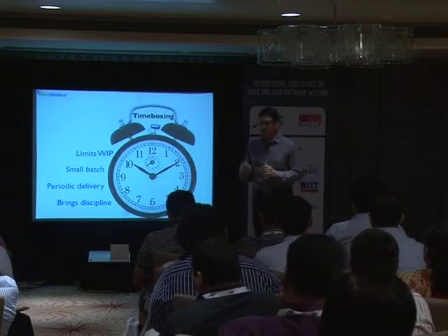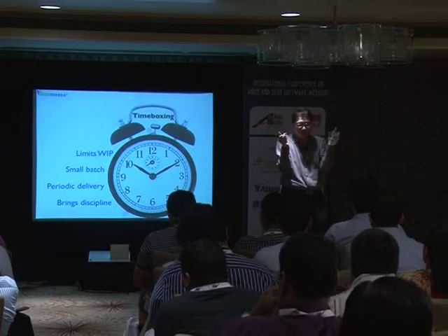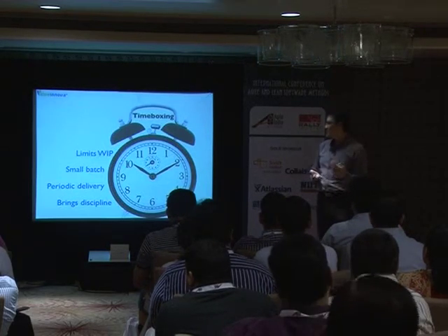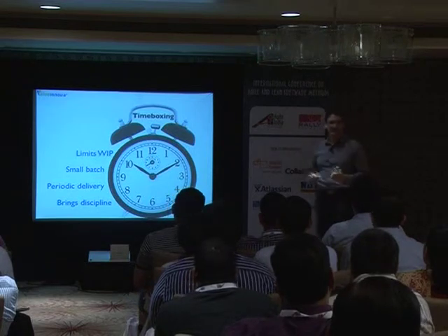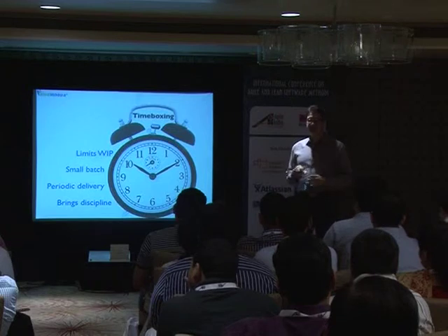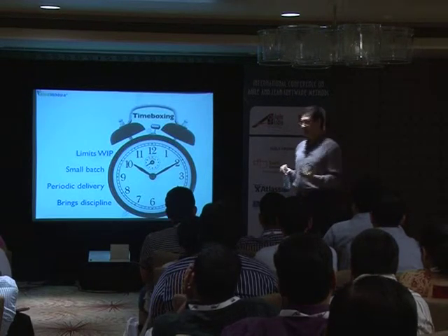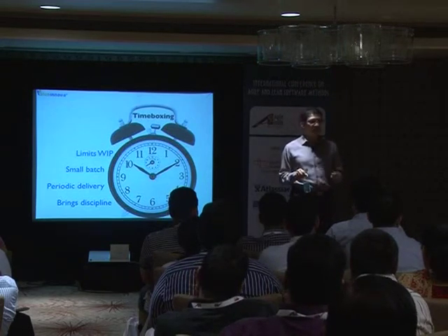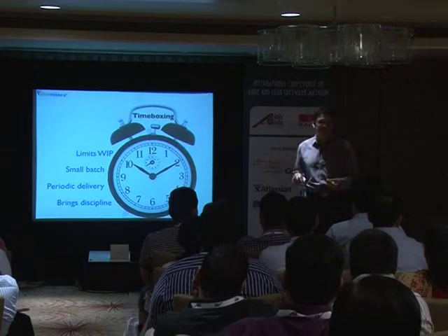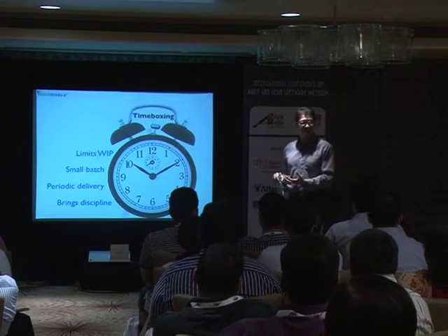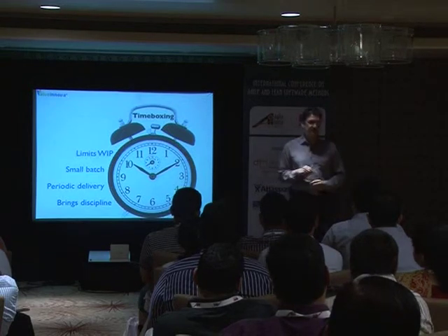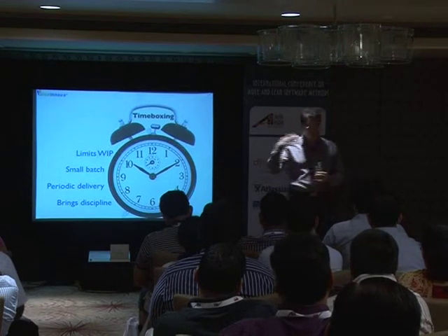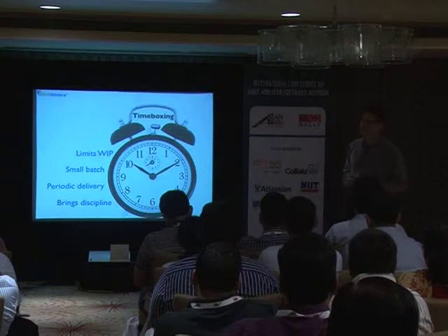There's also another aspect, which is small batches. The fact that we have a small time box obviously forces us to have a small amount of work to do. And having a small amount of work to do means we want to have a small batch. What is the advantage of having a small batch? Well, the advantage is that it allows us to focus more easily on getting a small amount of work well done, which is much better than doing a large amount of work poorly. And there's also a psychological advantage. And if you don't believe me, just try it yourself, either with yourself or experiment with someone else.